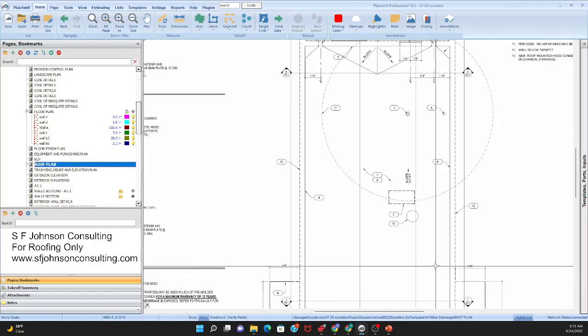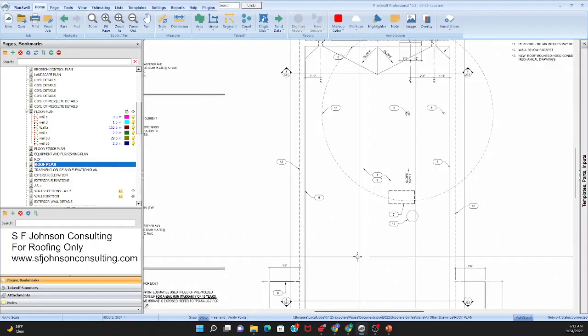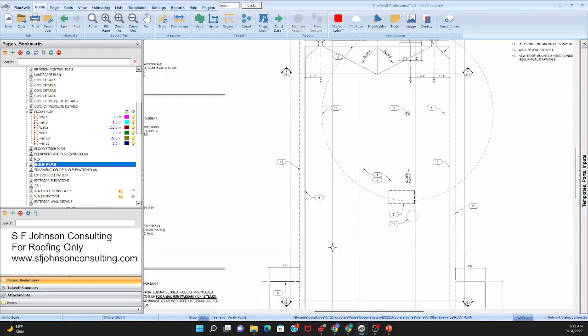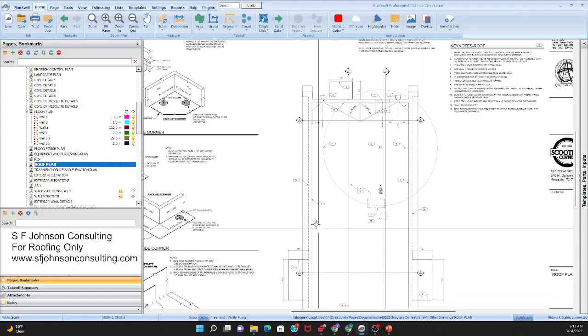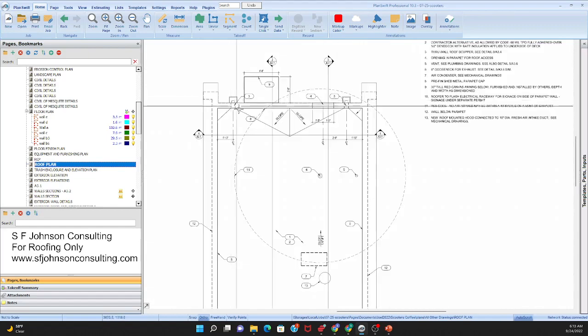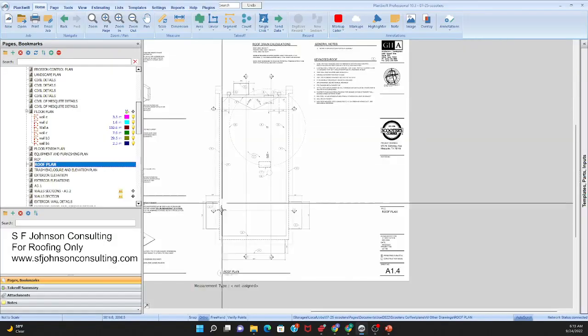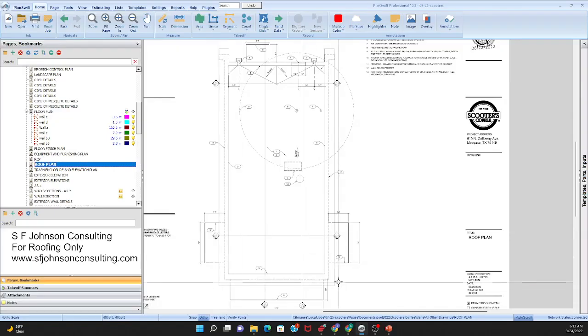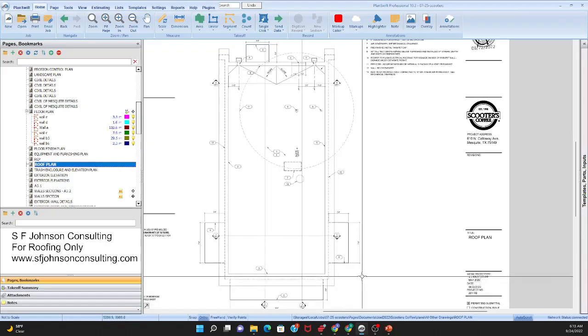Okay, so that's why we have the TPO roof on the roof and over the parapet, and with a parapet cap with the caulking so water doesn't intrude into the building. Okay, and so what do we do as the roofer? Square feet of the flat roof. Now we know we have to break up the section view, right? Because at some points this parapet wall is 3 feet, some points it's 5 feet. So we have to do 5 feet times however many linear feet. So we're accurately determining the additional TPO for the parapet wall, right?